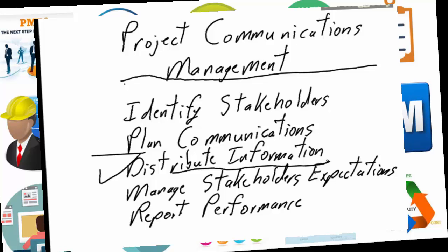that you're providing monthly status reports in a summary format, probably graphical, to senior management, and it's being done as a PowerPoint presentation, that you're following up on action items, that you're effectively distributing all of the information related to the project. And with effective distribution of information, we're well on the way to effectively managing the stakeholders' expectations.